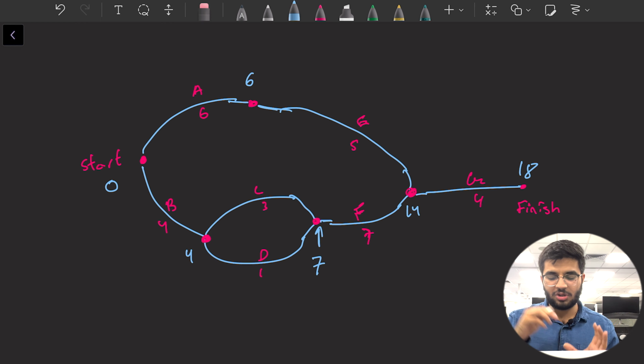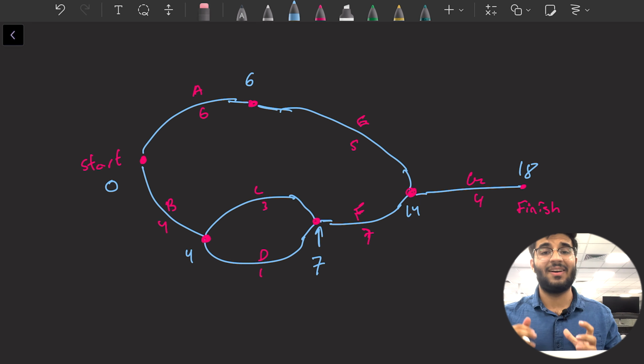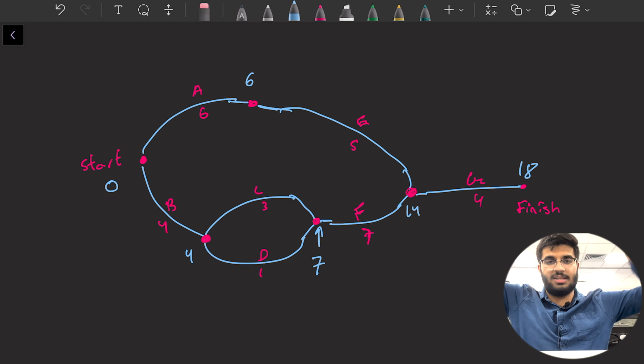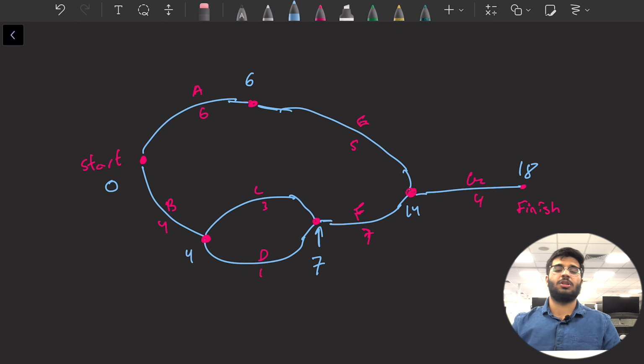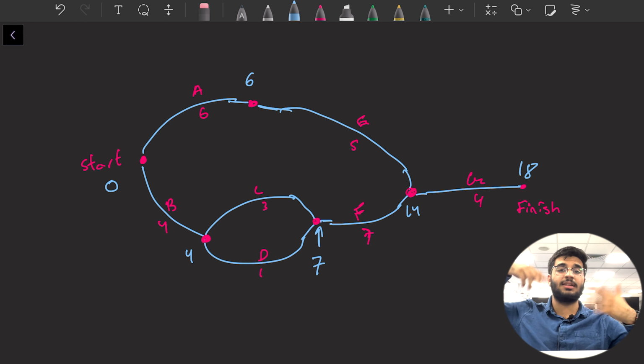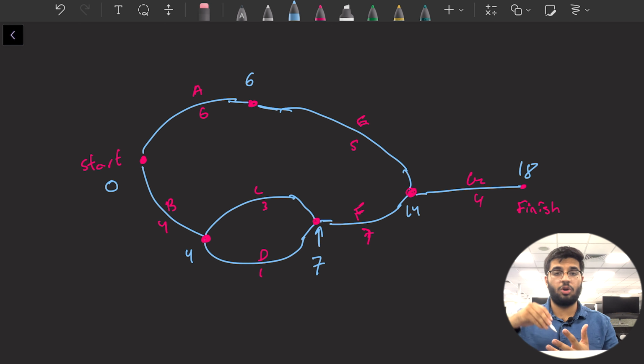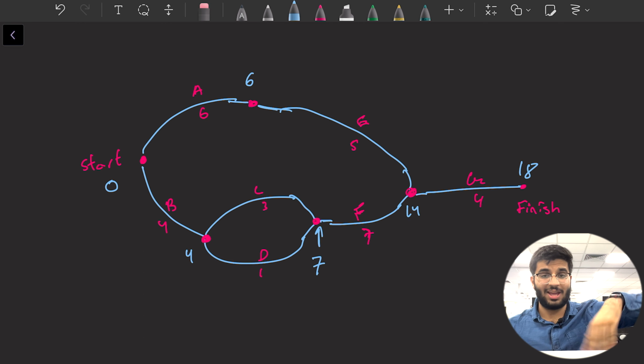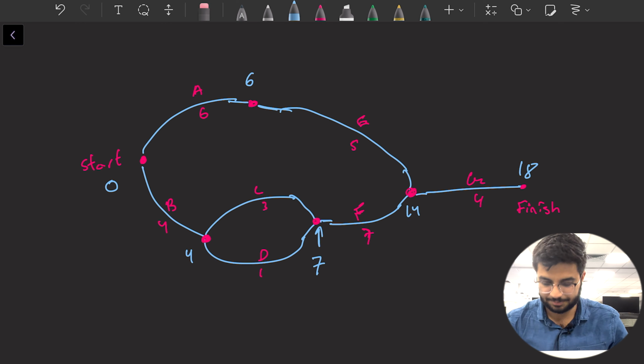You go to every state and find the biggest way, biggest number, biggest part, time, whatever, to get to that state. All right. And why do you find the biggest? Because if there's multiple branches ending up on the same node, all of these branches can be done simultaneously. Whichever takes longest, all of these branches have to be done because they're all prerequisites. Whichever takes the longest, that means that we have to have that done to be able to progress.